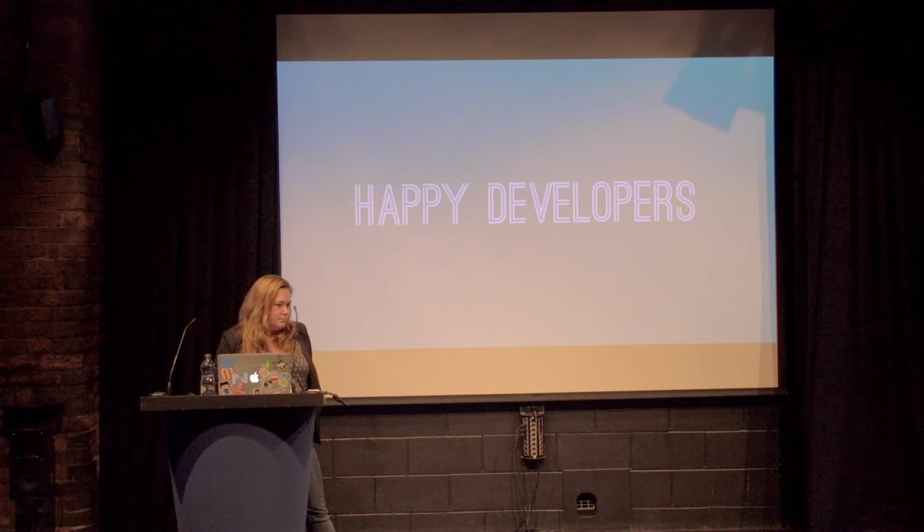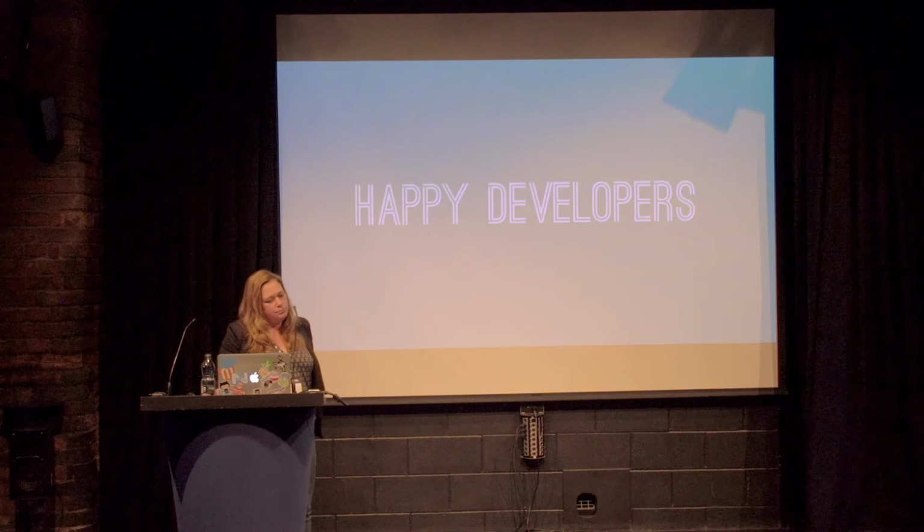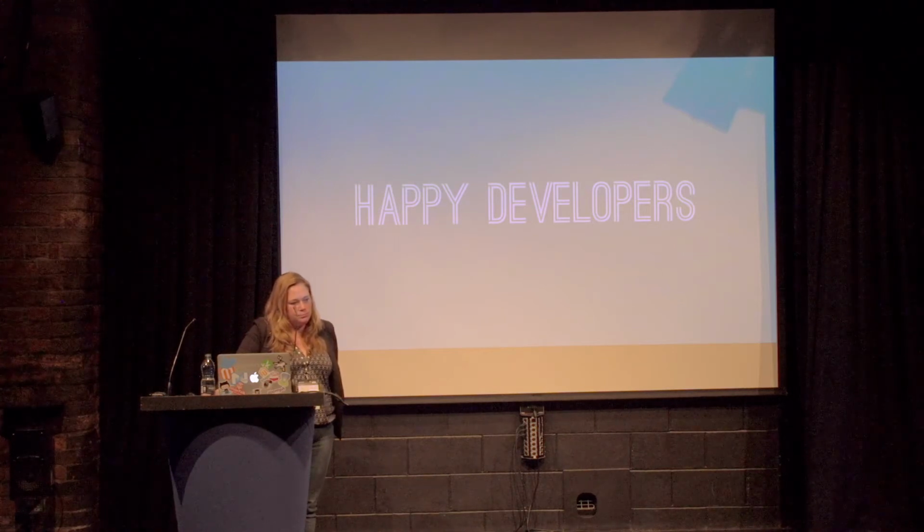But I found in practice that if I were to say something takes half an hour and my story is dependent on a third party or another team inside a company, then I really can't say anything about time in the complexity of a story. Whereas if I say, well, it's probably going to take so much complexity because there are so many parties involved, or I'm not certain about the documentation of such and so, then I can make a better estimate of how I'm supposed to spend my time.